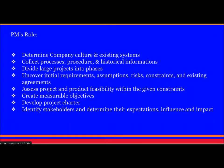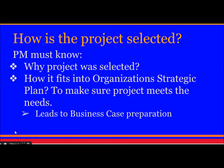The PM's role includes determining company culture and existing systems, collecting processes, procedures, and historical information, and dividing large projects into phases. The PM also uncovers initial requirements, assumptions, risks, constraints, and existing agreements, assesses project and product feasibility within constraints, creates measurable objectives, develops the project charter, and identifies stakeholders to determine their expectations and influence.